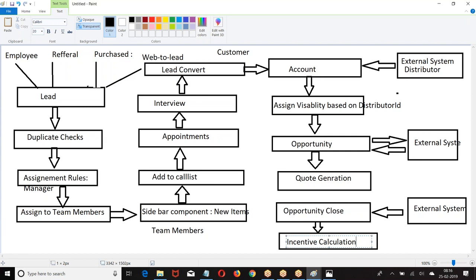Now, according to your organization, on what basis are the tasks assigned to you? We are following a point system. For every backlog, we give rating points 1, 2, 3, depending upon the complexity. The TPO will give a set of points on the user stories. For every user story, there will be a couple of backlogs, maybe 1, 2 or 3. The requirement is the user story, and based on the requirement we may divide it into a number of tasks. It may have only one task or a group of tasks.